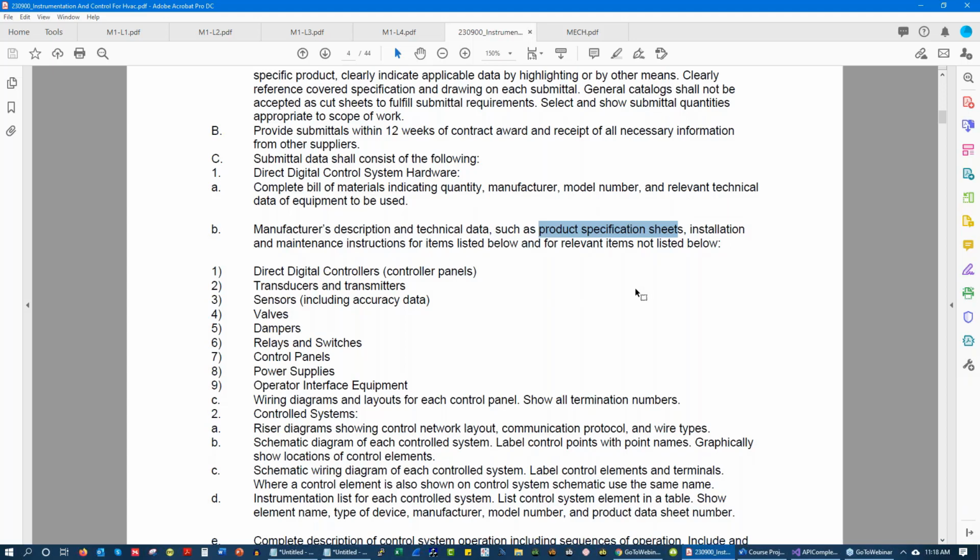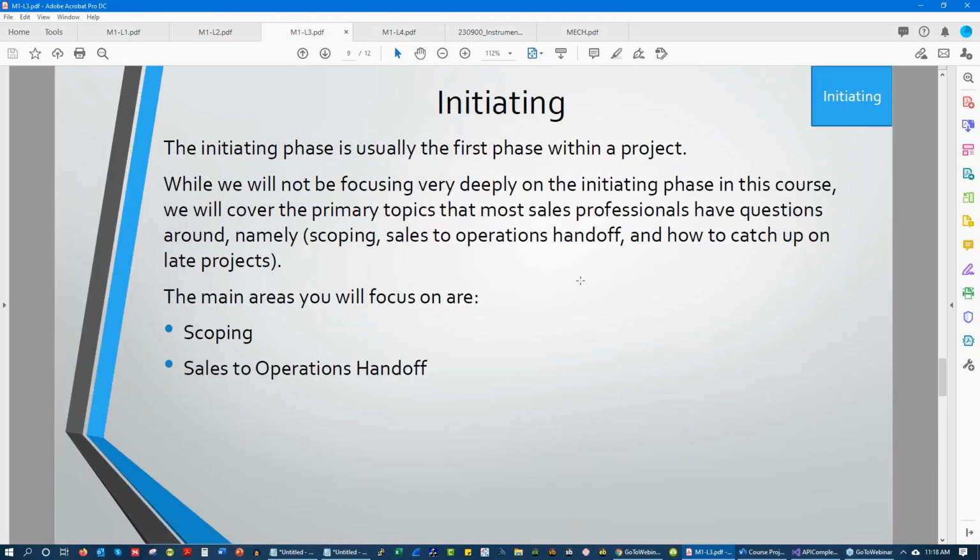And then they get their submittals rejected and they're like, why? Or they don't do an input review. They don't get the latest addendums and then they miss an entire part of the building. Or they rush through things and there's not an accurate RFI or RFC. I'm telling you from experience, if you do RFIs and RFCs during the initiating phase, and if you go right here, right? So during your initiating phase, you're going to do your RFIs, RFCs, and scope review.